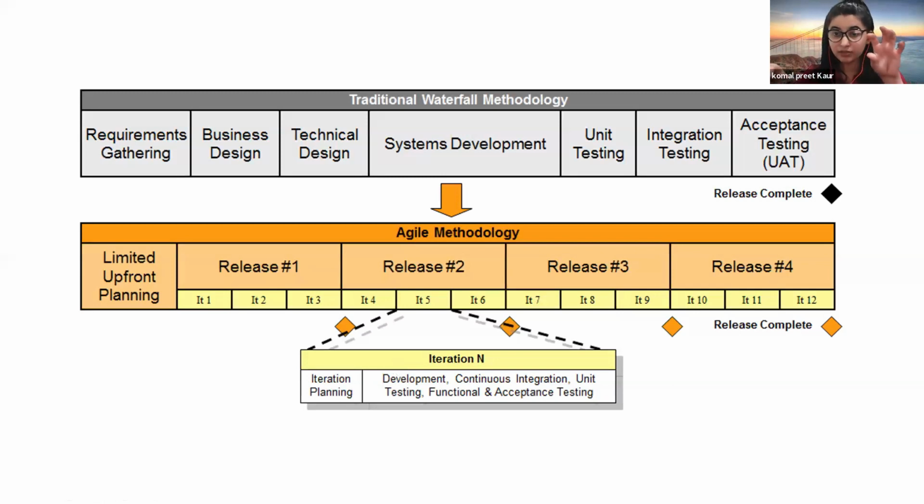But in the first sprint, first iteration, we are just focusing on 4 main features. Prioritized features for a food app can be a login page and sign up page. Second, once login is done, a few menus that they can add, the menu pages. Third can be important: a Google Map, right? That will be very important, because if you order anything online, the first thing they ask for is your location, right?